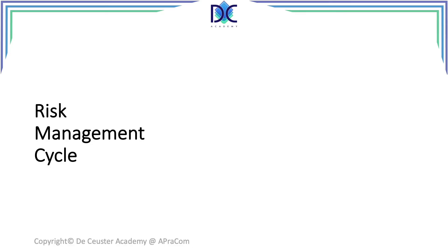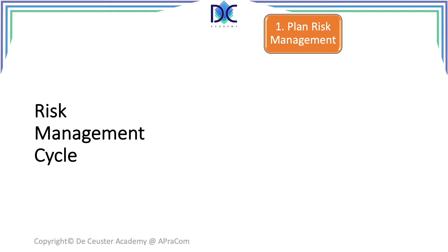The risk management process describes the different process steps that will be completed related to risk. The first step is plan risk management. In this step all the basic definitions, guidelines, techniques, tools and principles are described. These can be defined in general as part of the project management methodology of the company, but they also will have to be adjusted to the specific needs of the actual project. Risk planning includes amongst others: calculation methods, the probability and impact matrix, risk impact levels, frequency of meetings, reviews and reports.